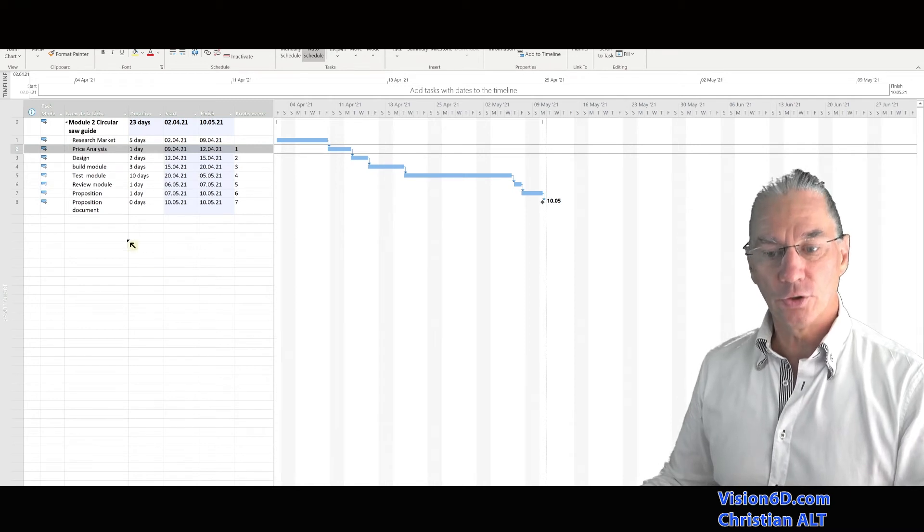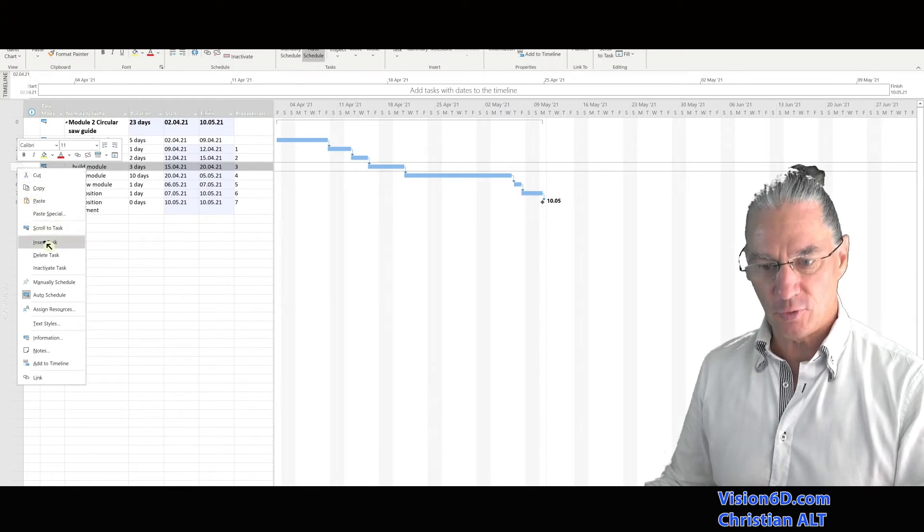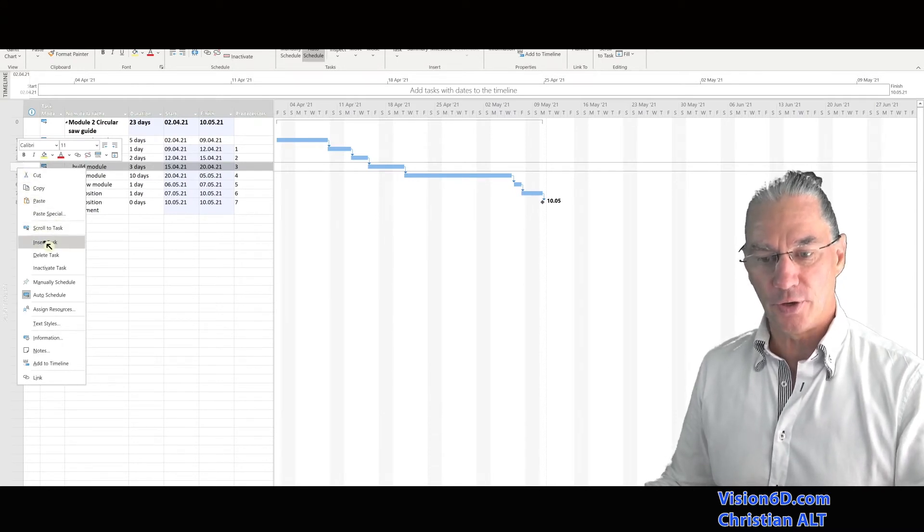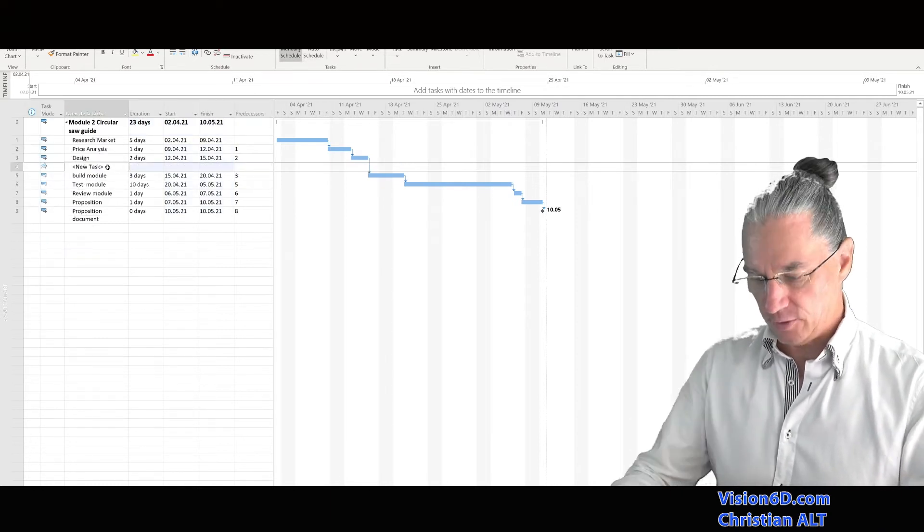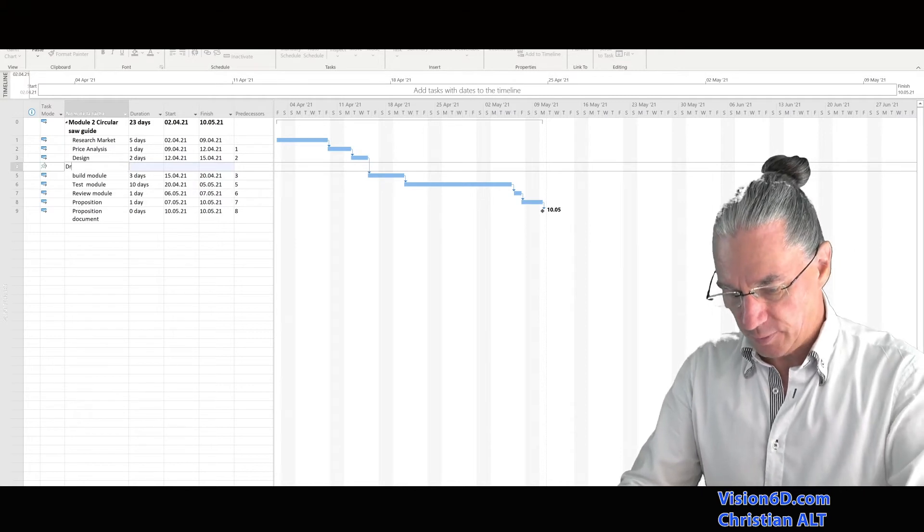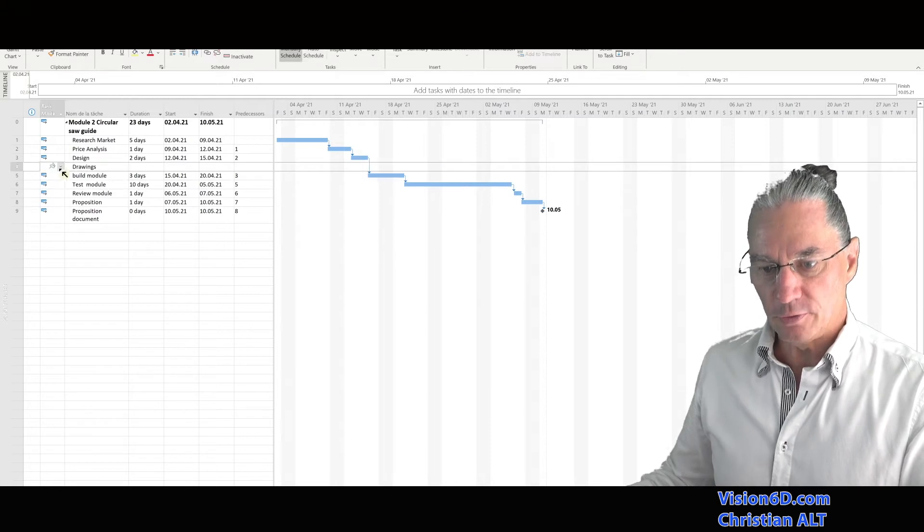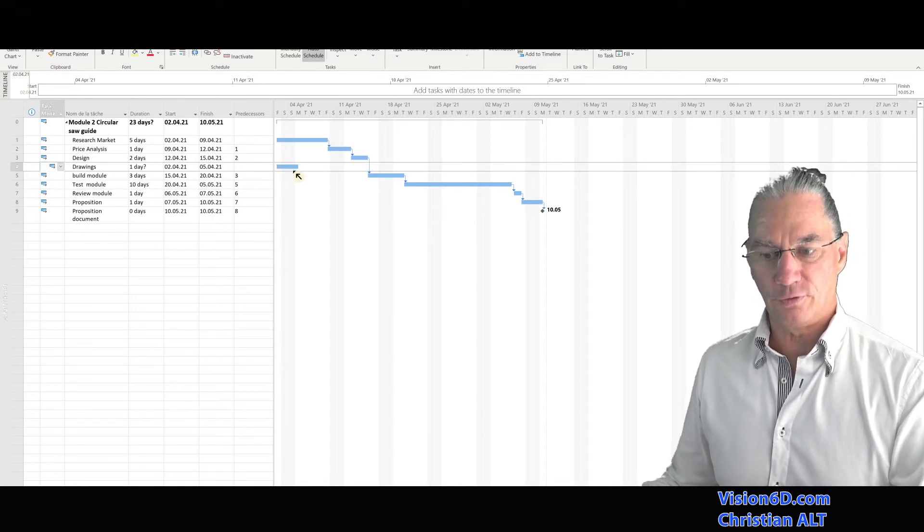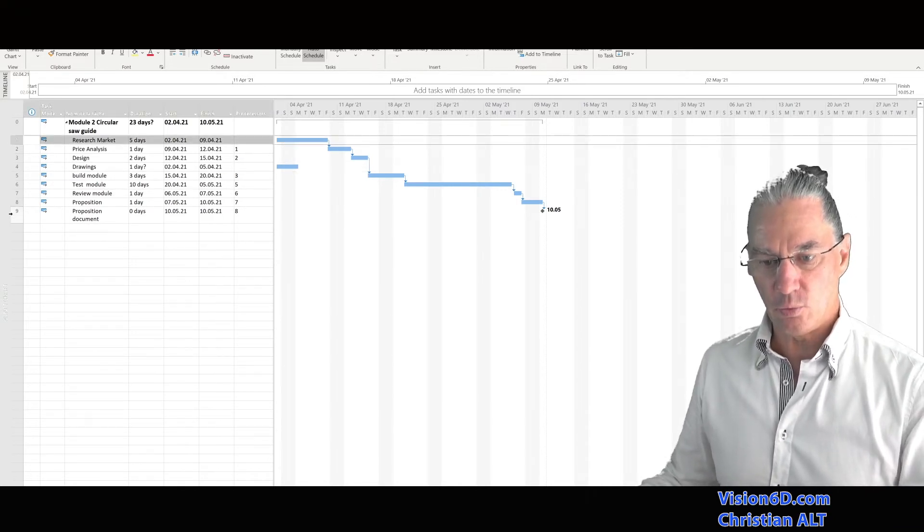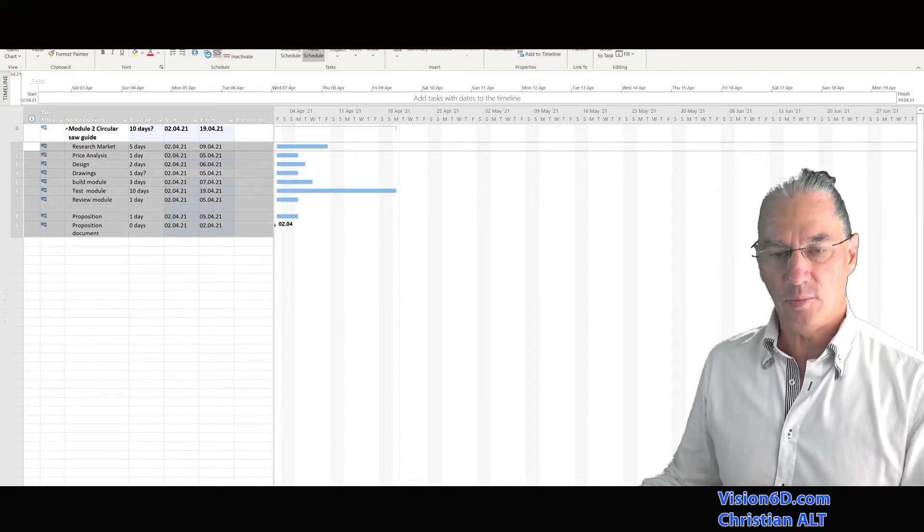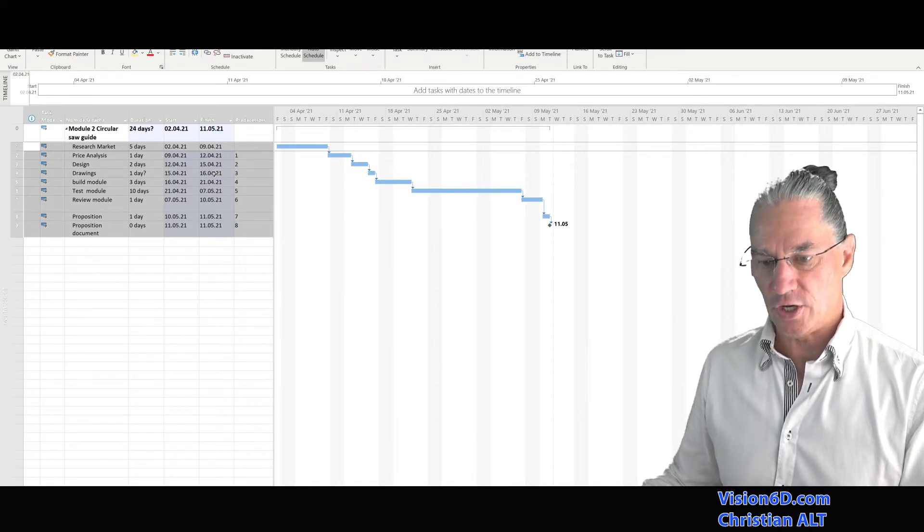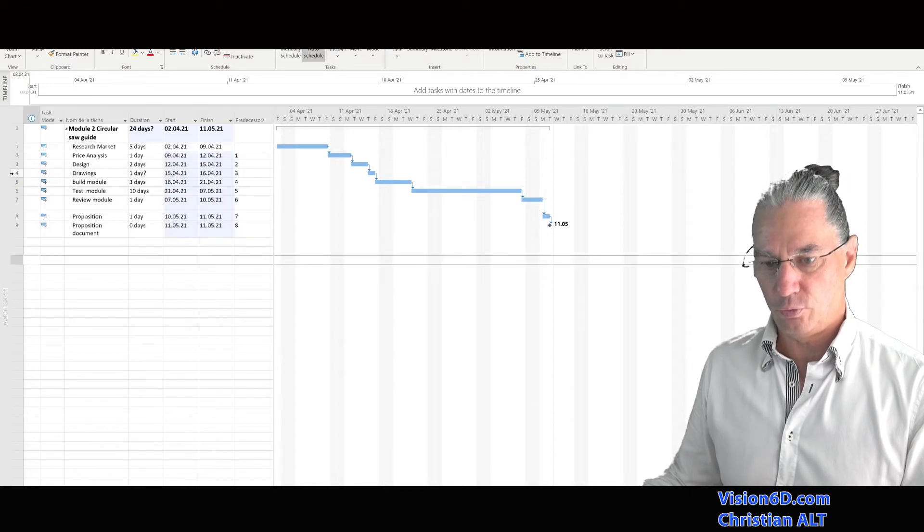Now in this module, I had also to do some drawings after the design. So I'm going now this time into the sub-project to insert a task. And I want to see what happens. So I'm entitling these drawings. They will be set in auto-schedule, and the duration of one day is perfect for me. So once again here, I will unlink all the tasks and immediately relink them like that. It includes that task that I just added right now here, the number four.